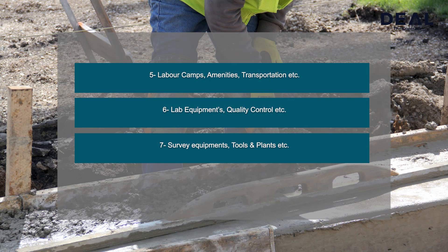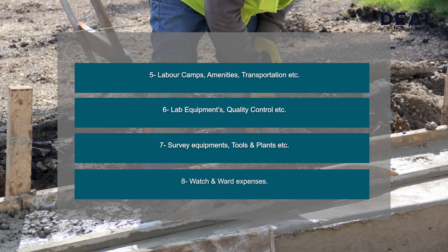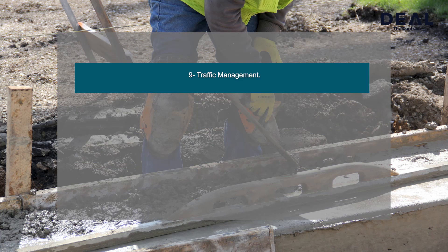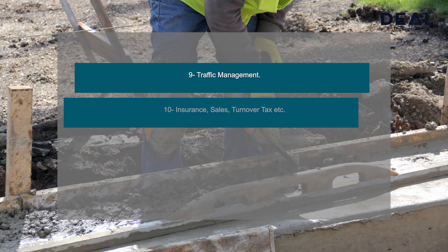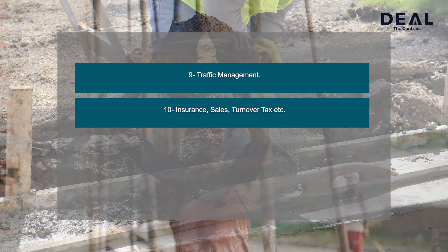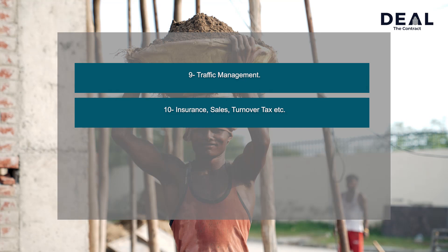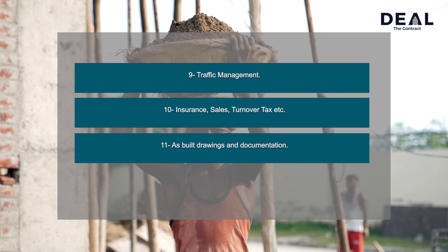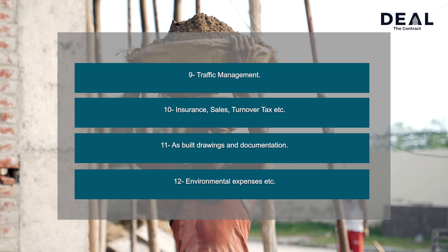7. Survey equipment, tools and plants. 8. Watch and ward expenses. 9. Traffic management, insurance, sales, turnover tax, etc. 10. As-built drawings and documentation. 11. Environmental expenses, etc.